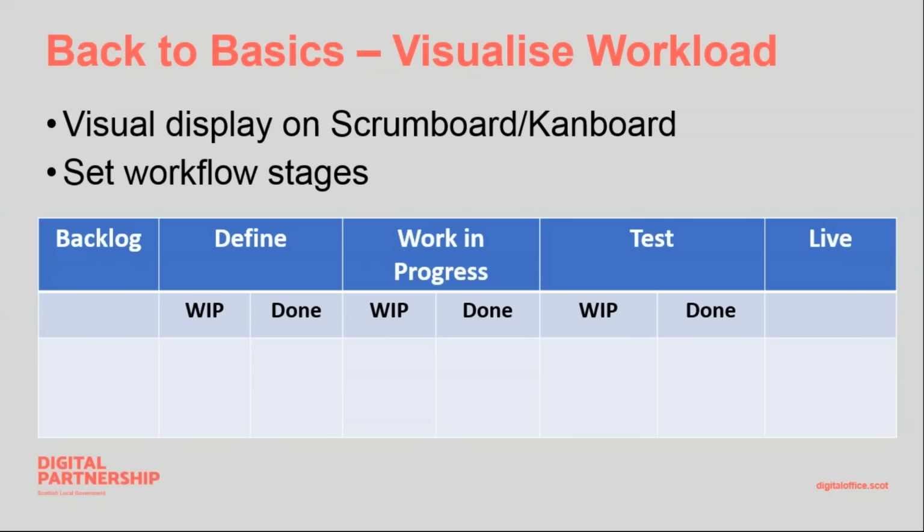And finally, we chose to have a live stage as well, and we kept work in here for a short period of time just so that we can actually see the work that we were achieving before it was whipped off the board. So these stages really worked well for us for quite a long time, but as you can see, we added in the work in progress and done to each of the do stages, and that was really just to indicate when work was completed and ready to move on to the next stage, so it didn't sit there for any longer than it needed to.